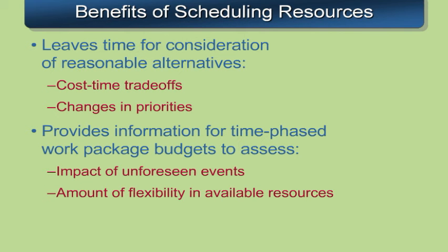This work, I know, sounds challenging and sounds to be a pain, but there are some benefits to doing resource scheduling. We can really hammer in on our trade-offs between time and cost. We can really go back to management and say, okay, here's what the schedule looks like once we put people on it. Do we need to change our priorities? Another reason why we want to schedule resources is that we get information for the work packages, and ultimately we can actually phase the budget in. This lets us plan for unforeseen events, and it also gives us some flexibility in how we're going to use our resources.